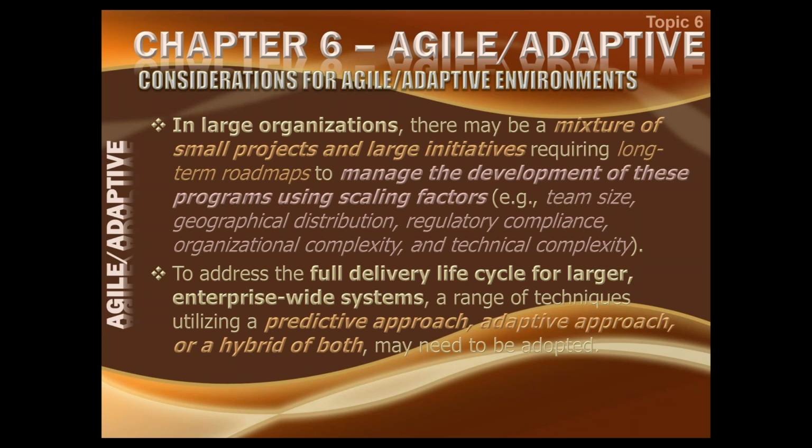Every scrum has a scrum master, but all these scrum masters may be reporting to a scrum of scrums master. So this is called scrum of scrums. You are scaling the scrum up, and there could even be another level. So this can be a hierarchy of scrum of scrum of scrum. So it could be like a portfolio.